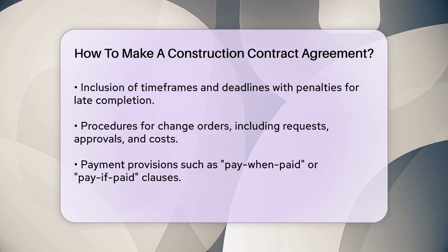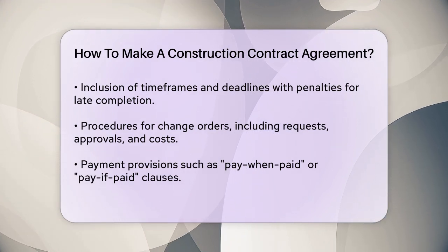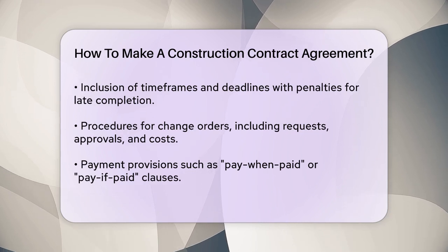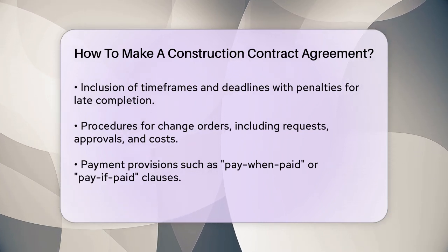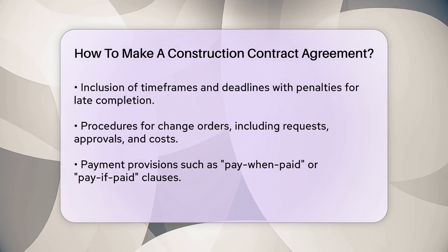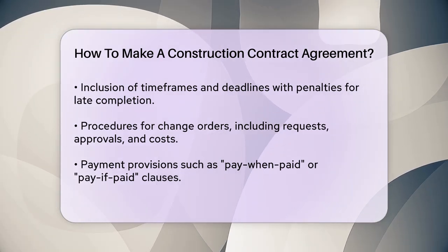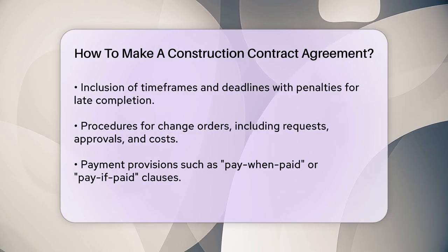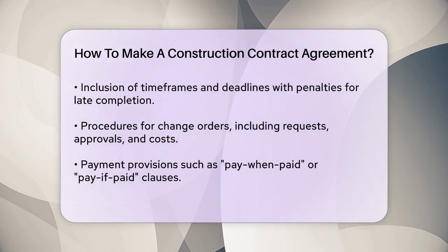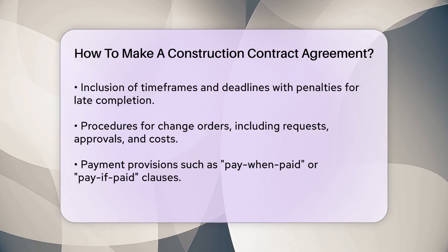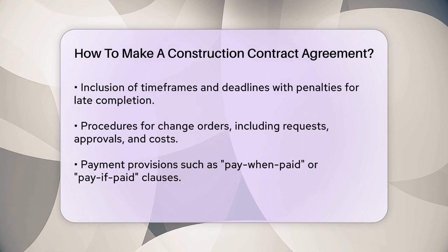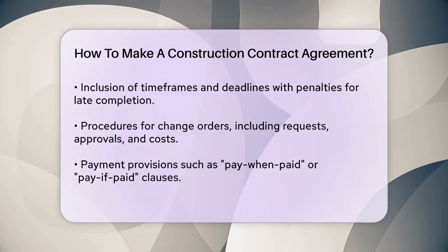Timeframes and deadlines are crucial. The contract should specify the expected completion date and account for any potential delays. Penalties for late completion or other breaches of the contract should also be included to protect both parties. Change orders are another important consideration. These are procedures for handling changes to the original scope of work. The contract should outline how changes will be requested, approved, and implemented, as well as any additional costs or time required.